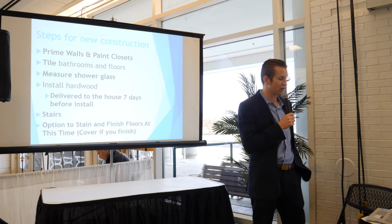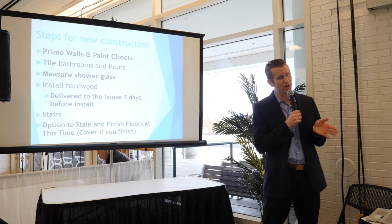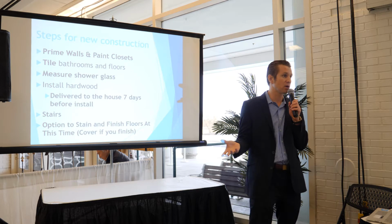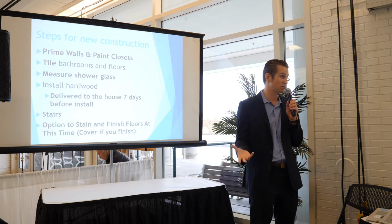This is when you're going to do your stairs. You definitely want to schedule your staircase specialty contractor out at least a month. We do beautiful staircases. There's not many contractors that do stairs.